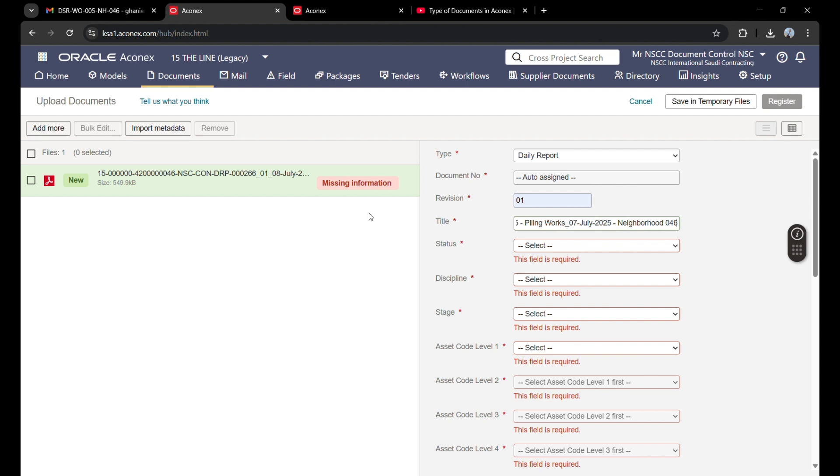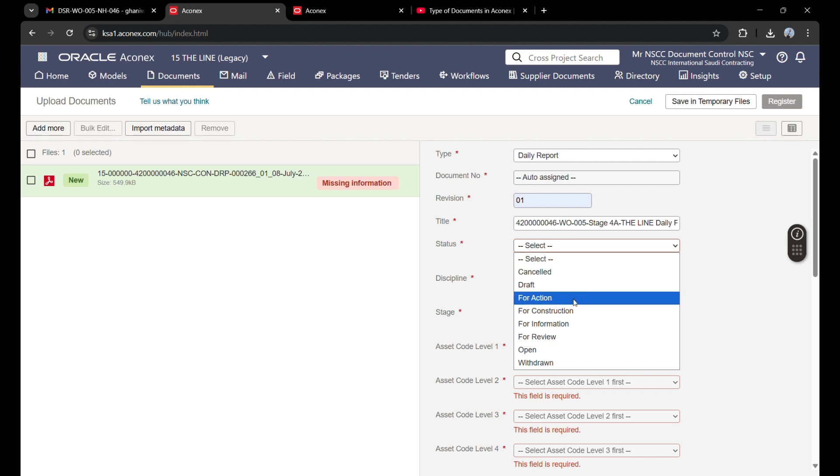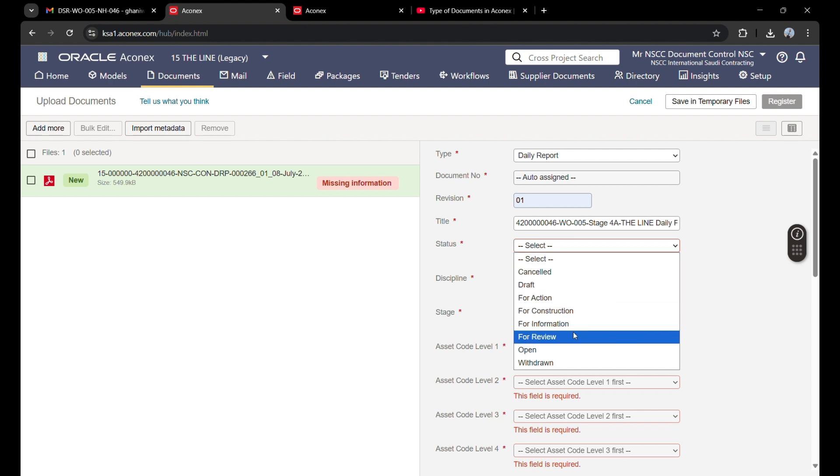I am pasting it here. Now this is 8th July, so I will just change the date. For status, you can submit it for drawing, for action, for construction, for information, or for review.